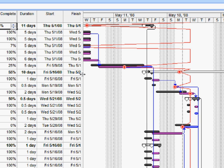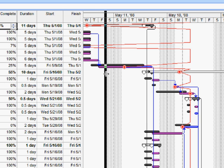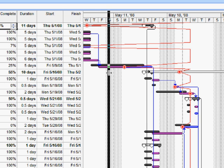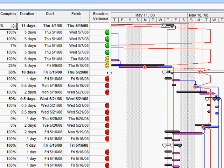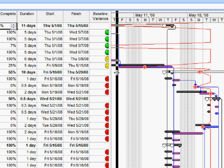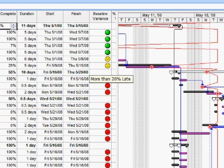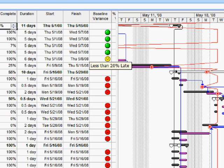However with graphical indicators we can facilitate that process. Here for example is an indicator that I've created called baseline variance and we'll see in a minute how we create these indicators. However this one quickly shows us those circumstances where we've slipped against the baseline. Here we've slipped by more than 20 percent. Here we've slipped but by less than 20 percent and the green ones at the top show that we're on schedule.